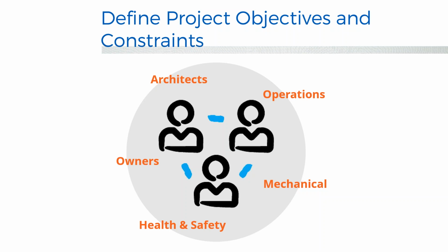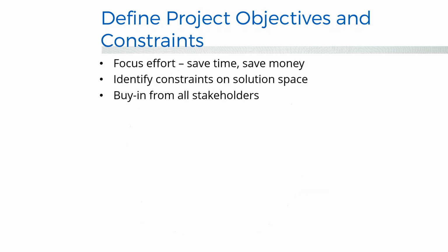So even recently I was working on, it wasn't a lab, but another public space, and we've been working with the architect and mechanical engineer on a very difficult area to maintain life safety, and after back and forth we had a tentative design, which then we presented to the owner's health and safety representative, and it turns out that he preferred a different metric to evaluating life safety than we had been using, which had implications, and our design didn't meet that metric. It wasn't a complete loss because the solution we had brought us a lot of the way to meeting that metric, but at the same time we had to rerun CFD, and there was lost cost and schedule time as a result of that. So very important to get everyone's opinion before starting.